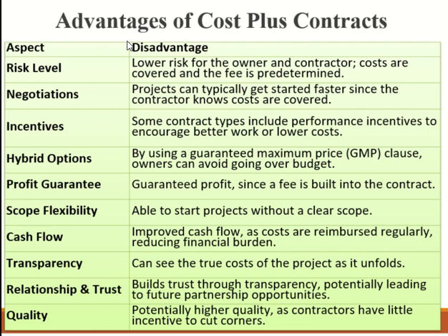So here it is better because you are only billing for the cost itself. So the client doesn't have to worry about whether he is charging me extra and so on and so forth. So the cash flow is better. The client can disperse the money immediately. In some cases, you can ask the client to do it directly. This is, I'm going to buy this one or rent this one. This is the invoice, and you can pay the subcontractor or the supplier directly, because you are not getting that money in the end.